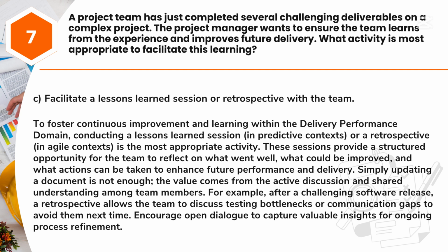Simply updating a document is not enough. The value comes from the active discussion and shared understanding among team members. For example, after a challenging software release, a retrospective allows the team to discuss testing bottlenecks or communication gaps to avoid them next time. Encourage open dialogue to capture valuable insights for ongoing process refinement.